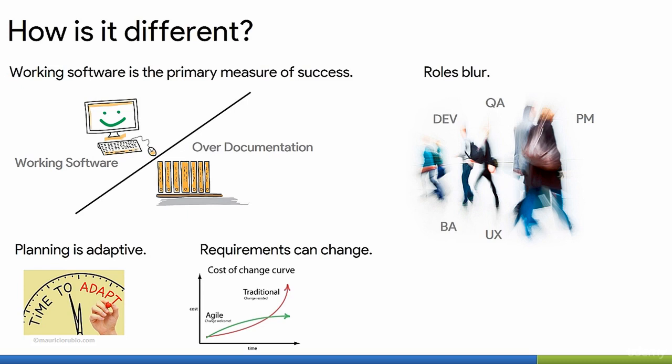Given scope is varying, you might negotiate with the product owner about some of the user stories of the next sprint and move them to the next one, or maybe remove them so that you can actually deliver and meet their expectations. See the difference? That's Agile. And that is why people love it. It's powerful.